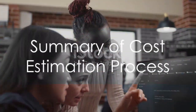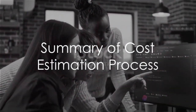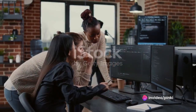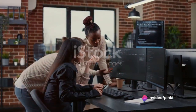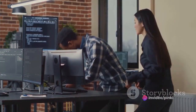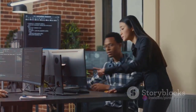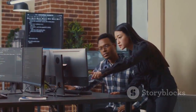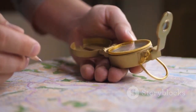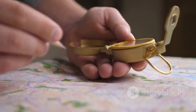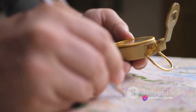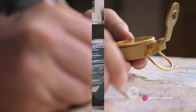To sum up, cost estimation in software development is a four-step process: defining the scope, estimating the resources, calculating the cost, and assessing the risks. It serves as a roadmap, a recipe, a translator, and a compass, guiding every project from conception to completion.